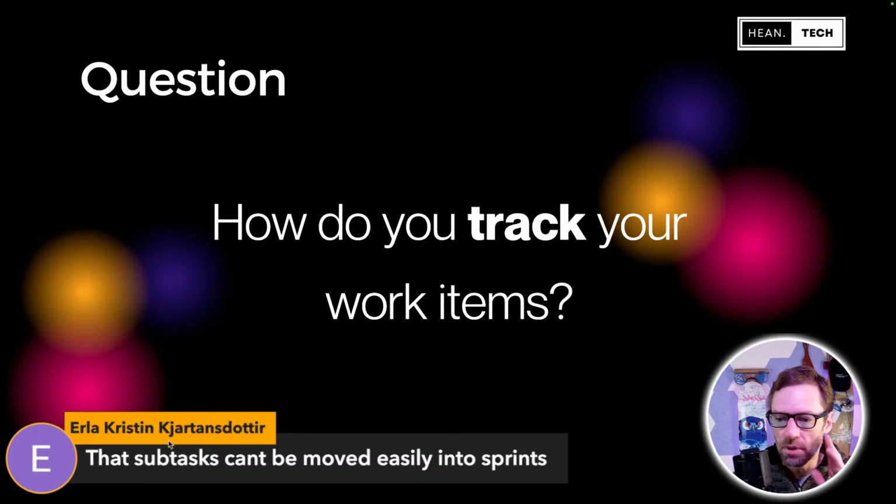Erla, I hope I'm saying your name properly. Subtasks themselves can't be put into sprints. They have to be connected to a task or a parent work item. So they can't just be moved.